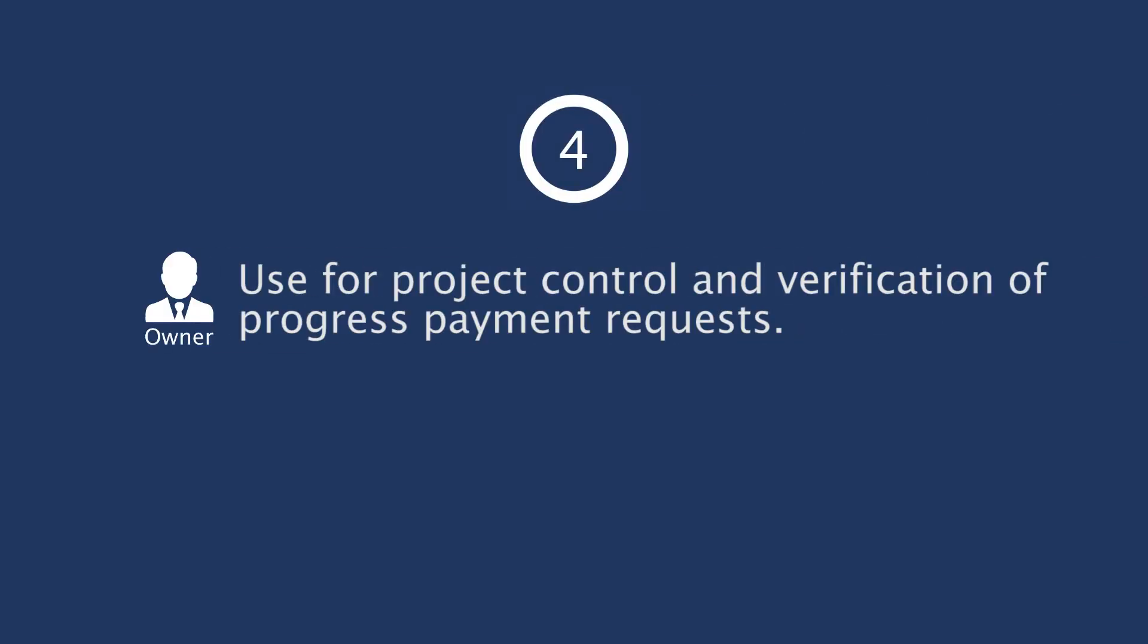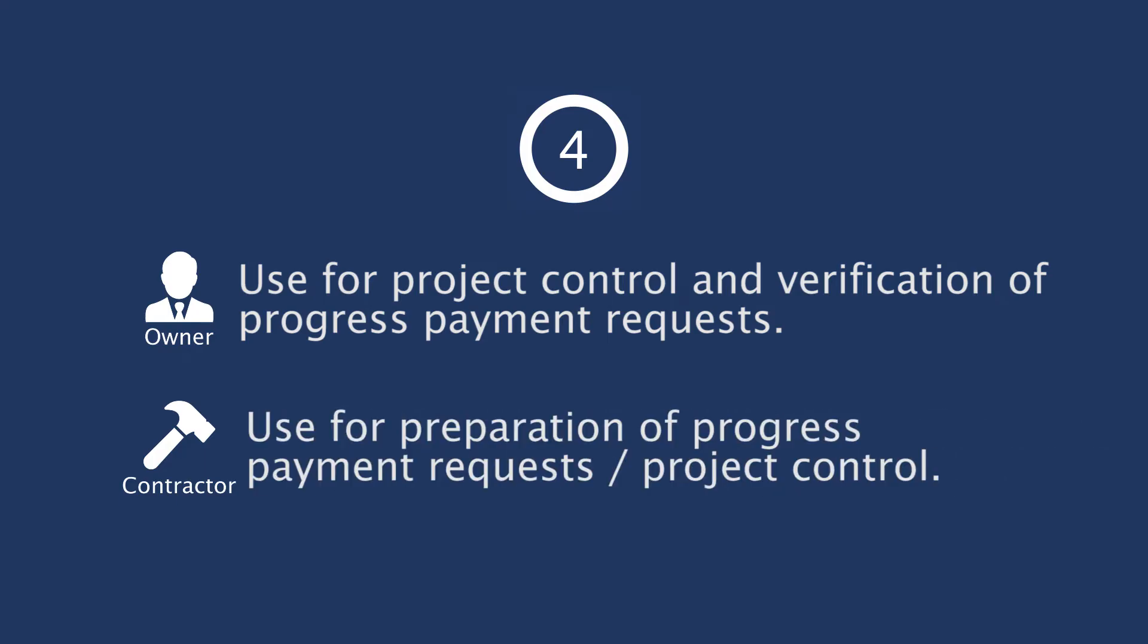We'll go back to why we schedule projects. We talked about reason number three, the cash flow diagram. Now we go to reason number four: use for project control and verification of progress payment requests. We just talked about progress payments, and there is a cycle in the construction industry, most likely on a monthly basis, that the contractor submits pay requests to the owner and the owner has to verify all the numbers in it.